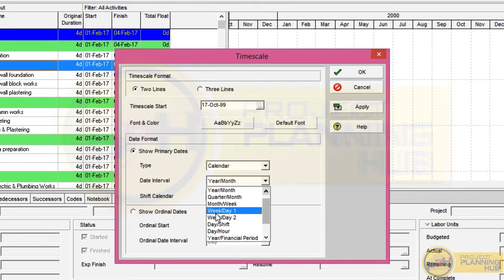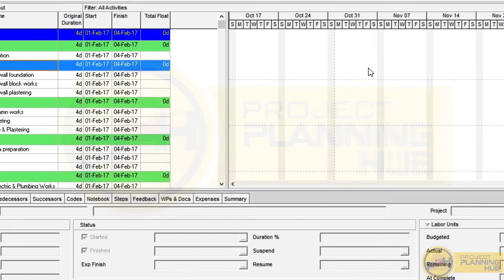We need to select a timescale format for our project. Our project duration is below 30 days, so for better viewing of the activity bars on the Gantt chart, let's select week per day. Apply it. Our timescale format is now week and day format.